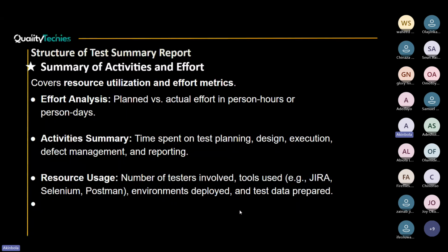Those effort analyses are also there. Activity summary, the time spent on planning, execution, and reporting, and the resource usage, number of testers involved, then the tools that were used, the environments deployed, and the test data that was also used. All this also is expected to be in your reports.